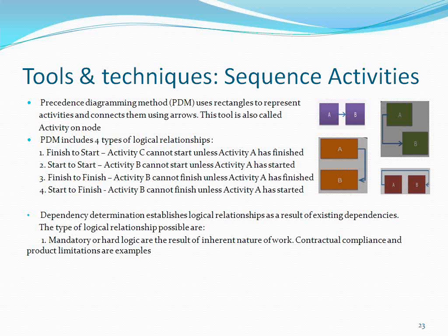Finish to start. Activity B cannot start unless activity A has finished. Like you can't start construction of the house unless you finish the foundation. Activity A is foundation. You have to finish. Here the left, finish, is about the predecessor activity and start is the successor activity. So the successor activity cannot start until a predecessor activity has finished.